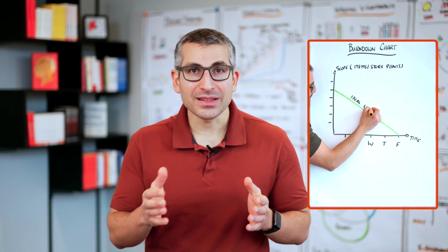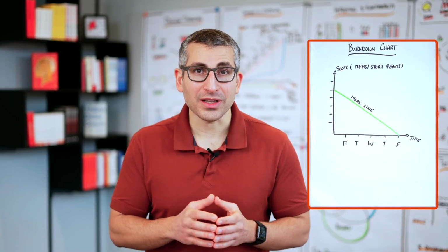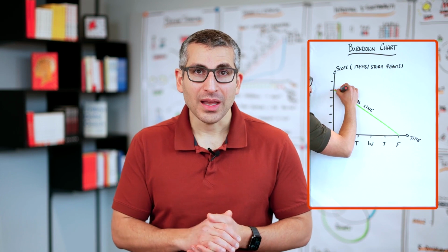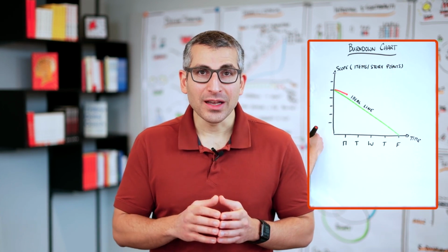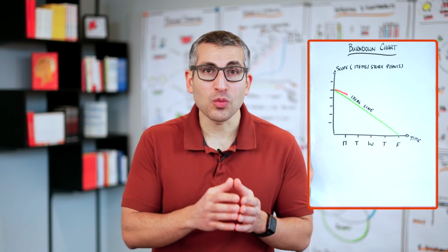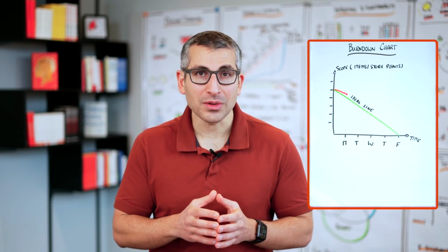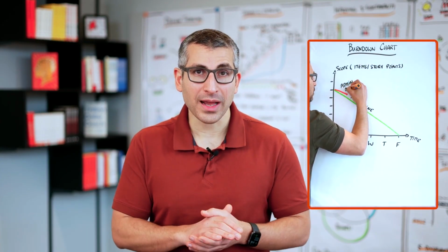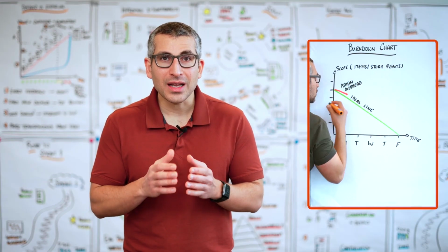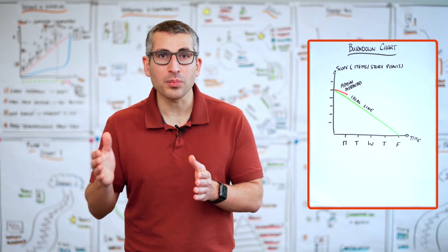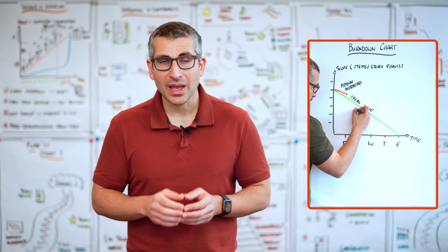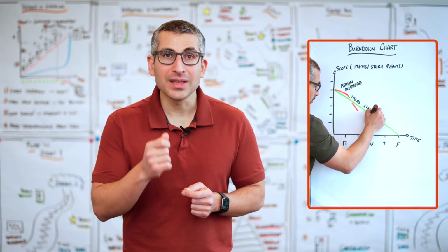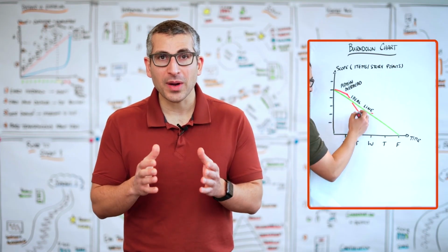Now, every single day, as part of the daily Scrum, potentially, we can go and see how much work we actually got done. In most cases, after the first day, we didn't meet the number of items that we wanted to deliver according to the ideal line, most likely due to the administrative overhead that we had as part of the sprint planning. But the first day is not so important. It is more important to see how we're making progress over the next few days. And now, once we see how we're making that progress, we can also make predictions whether we will meet our commitment by the end of the sprint.